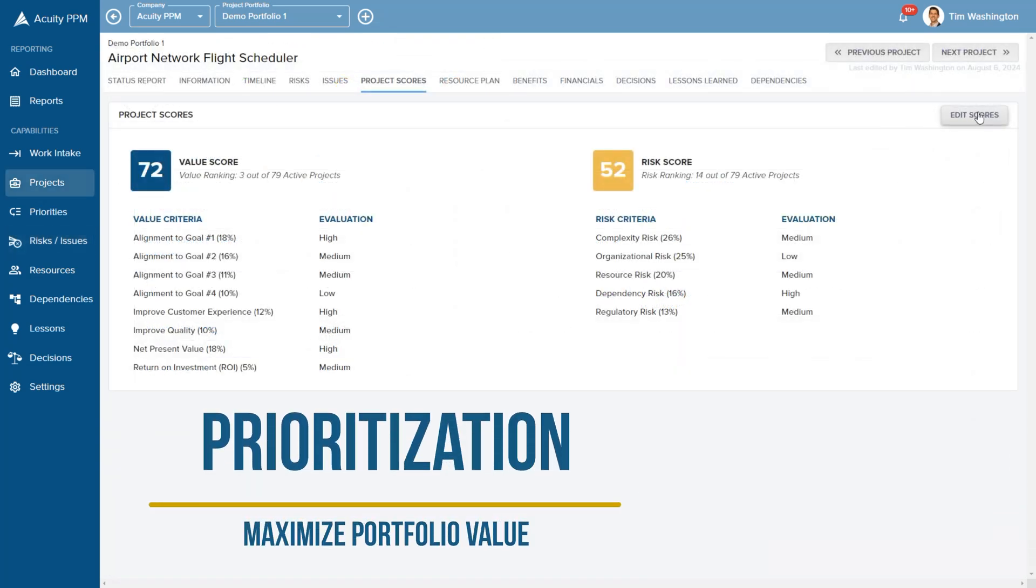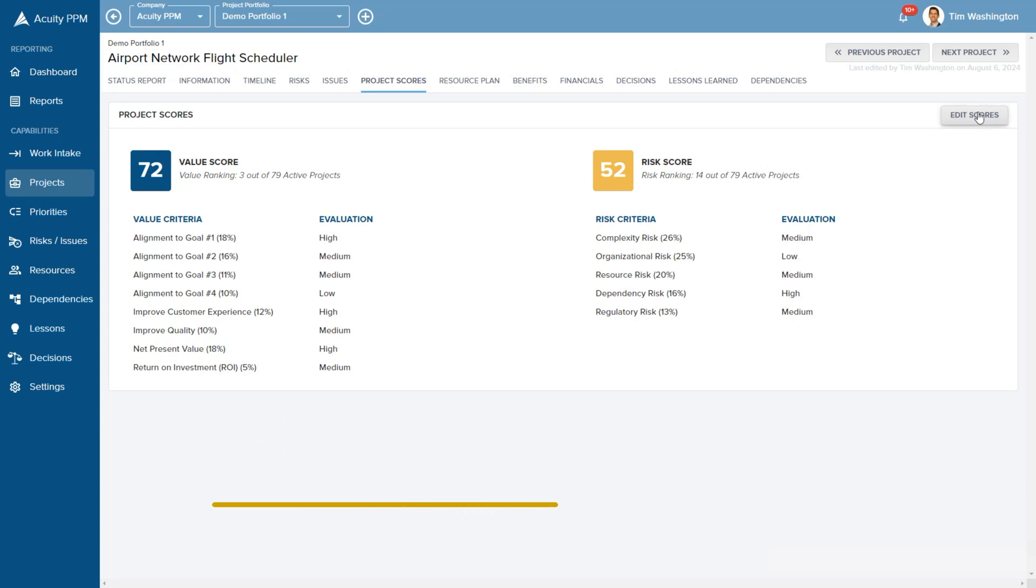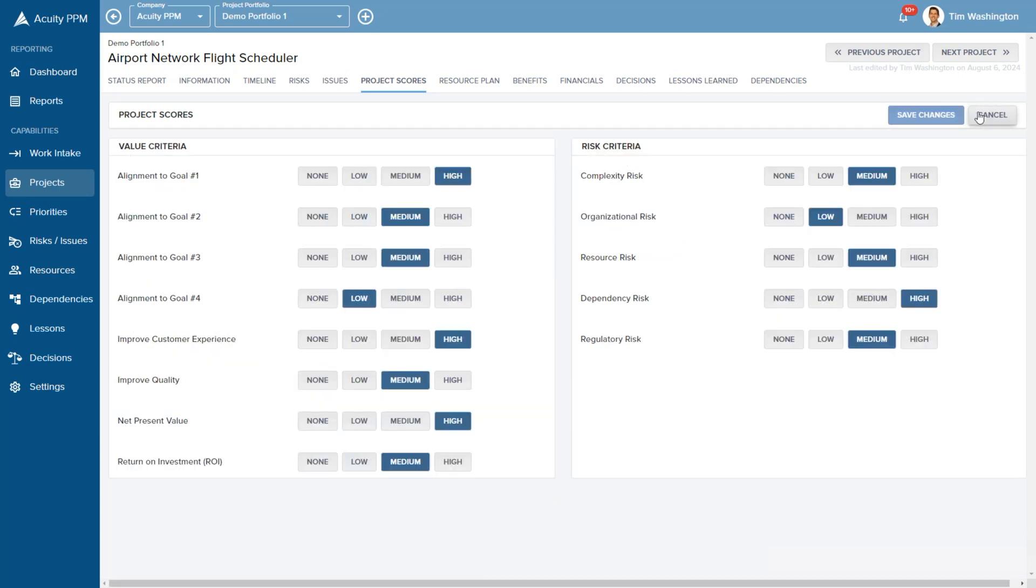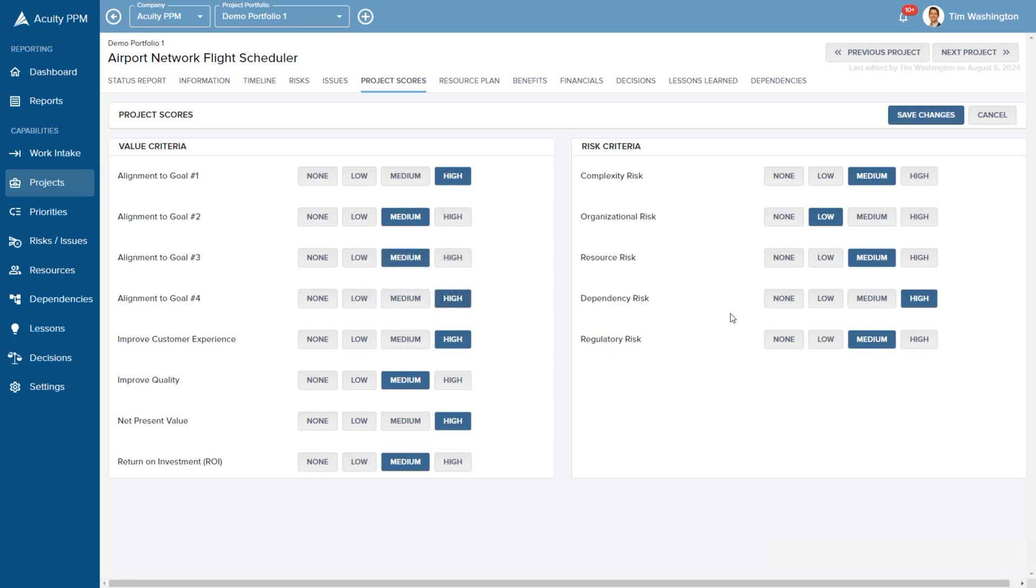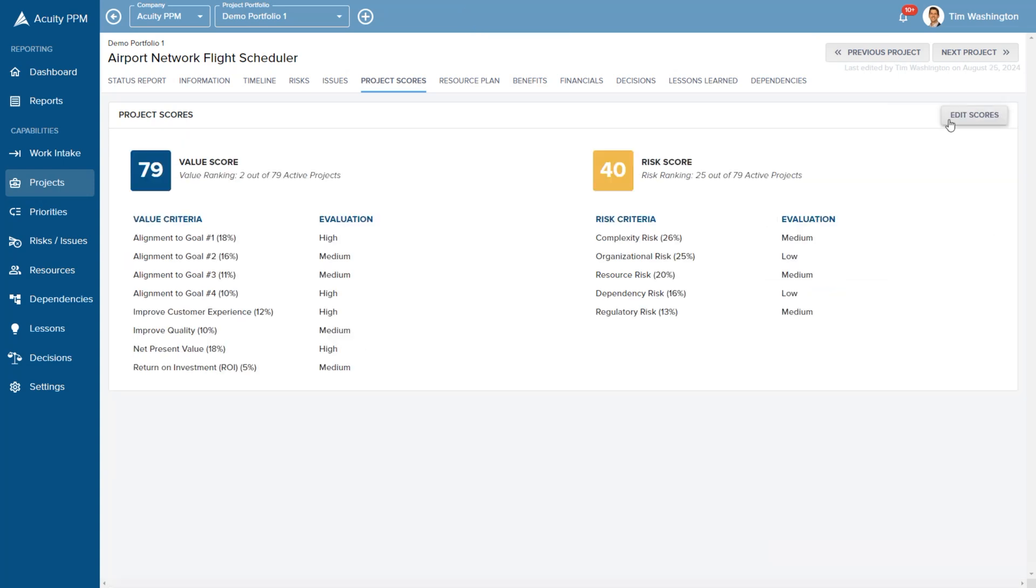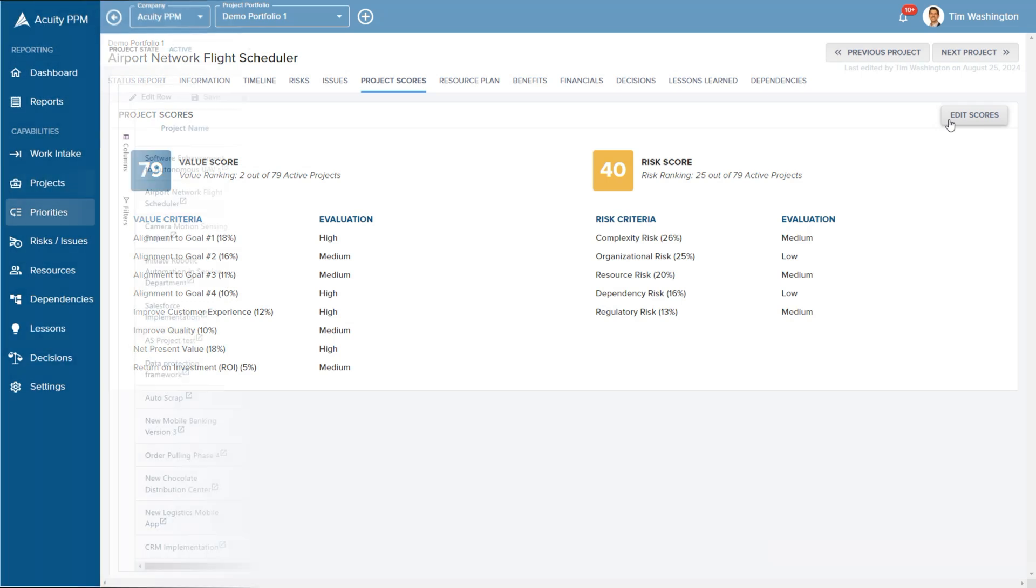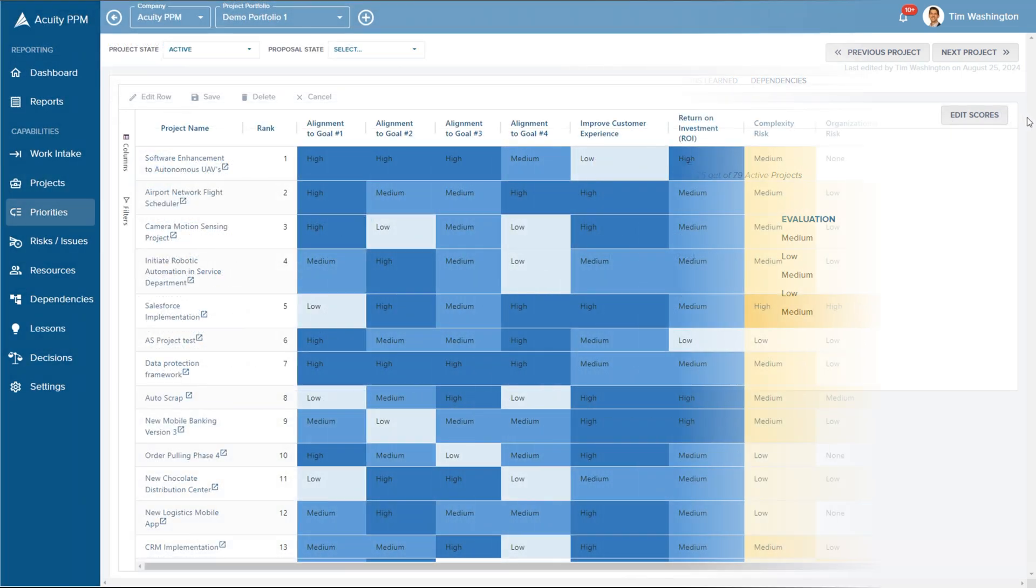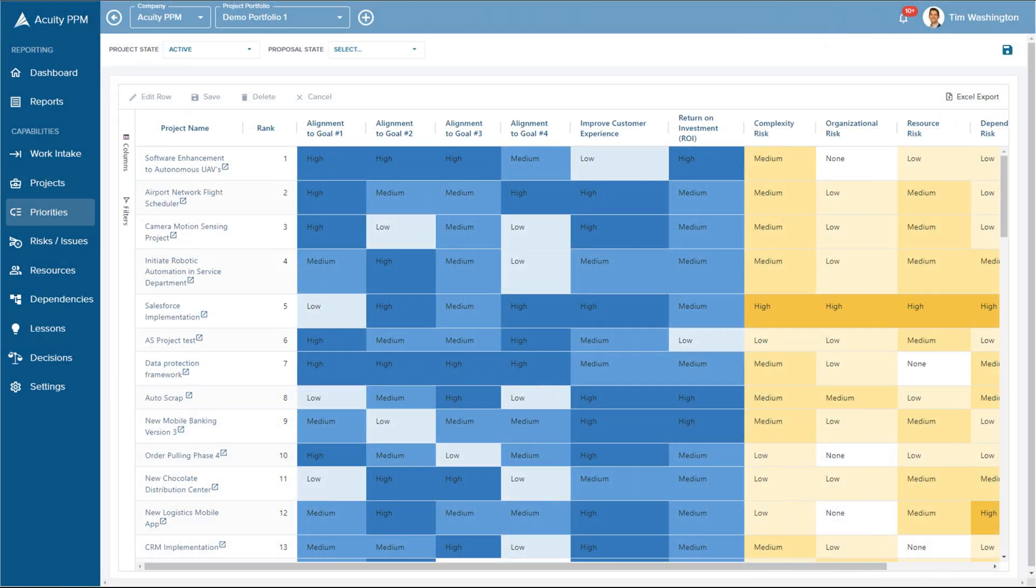Prioritization is a critical part of portfolio management. Acuity PPM lets you build your own weighted scoring model so that you can evaluate risk and value for each project so that your teams can focus on the most important work. We can look at the scores and rank of all projects and proposals and make updates in real time.